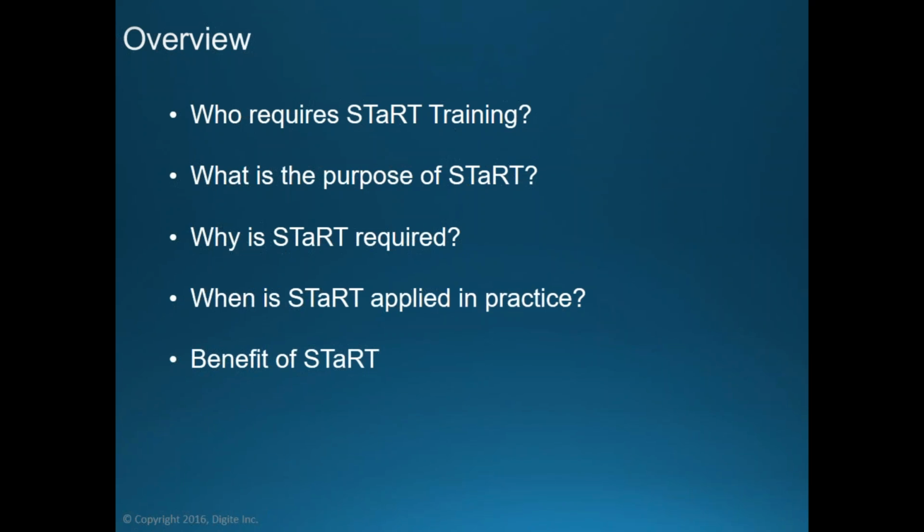Now, what is the purpose of Digité STaRT? It helps you in planning for small projects, or smaller sub-projects within the bigger project that you're executing. It's a very simple planning engine. It is not as complex and difficult to use as MSP. It works on fixed dates, task type, unlike MSP where it works on fixed duration, fixed unit, and fixed start.